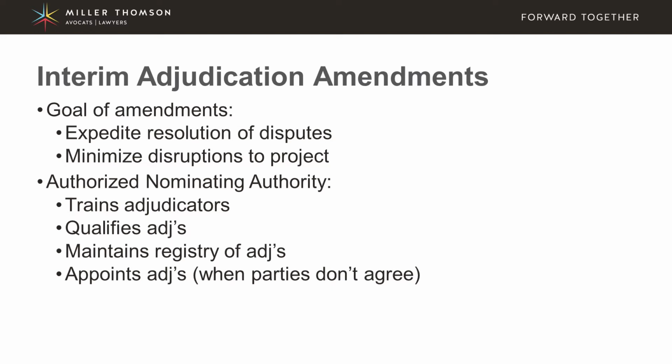And this authorized nominating authority is going to be responsible for training adjudicators, qualifying adjudicators, maintaining a list of adjudicators, and if the parties can't agree on which adjudicator to use for a dispute, then this authorized nominating authority will also appoint an adjudicator.